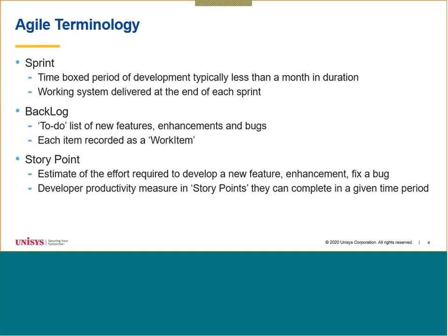Each item in the backlog typically has what are called story points. It's not hours of effort, it's an arbitrary number as to how long it will take to implement this thing. And each developer has a field against them saying they can complete X story points per day.